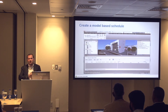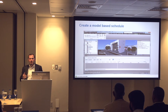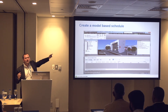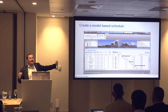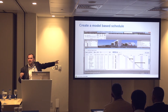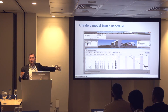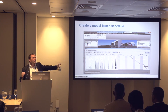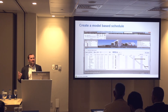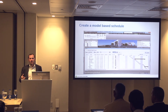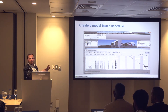Creating this schedule in the first place is often seen as quite cumbersome, but it doesn't have to be. Using search sets, you can drag and drop them into the order of your tasks, create your search sets with task names, and then use auto-add all tasks from the sets — you've created an instant model-based schedule. You can then export this out and view it in Primavera, Asta, or Project, then build it out in that application to add resources, costs, and any additional things for a more thorough plan. Rather than starting with a plan and retrospectively trying to make it work with a 3D model, you can use those early-stage 3D models to start building your plan.